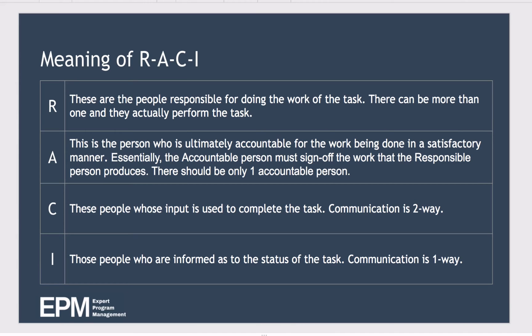C stands for Consulted — these are people whose input to the task is needed, so there's two-way communication with these people. I stands for Informed — these are people who need to be informed and they are communicated with one way, maybe with status reports.